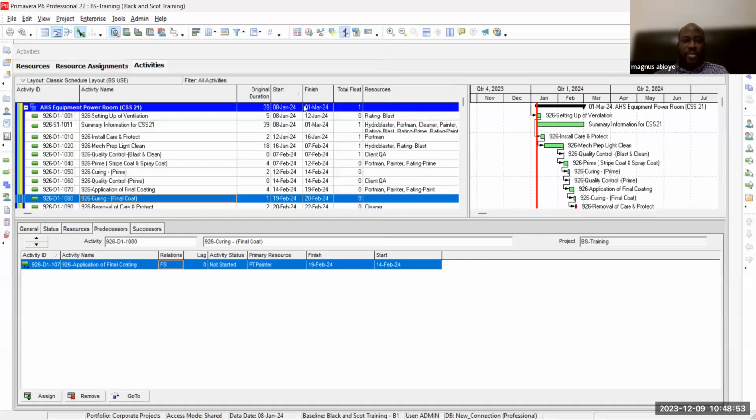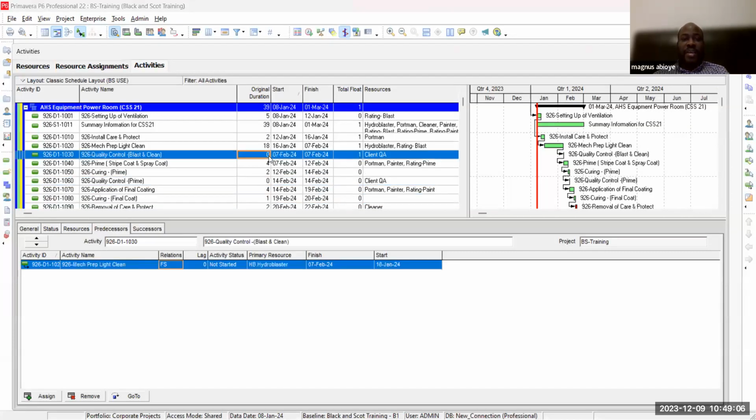If I click on close, did you notice that everything that you saw before has gone? All the hours and all the days are gone. It's giving me zero, which is what I don't like. And hence the reason why I refer back to that, because zero is meant for milestones. So that was the reason why I did that.